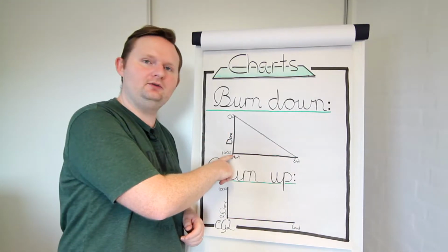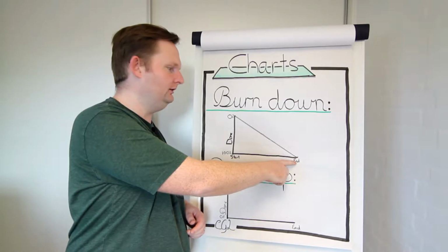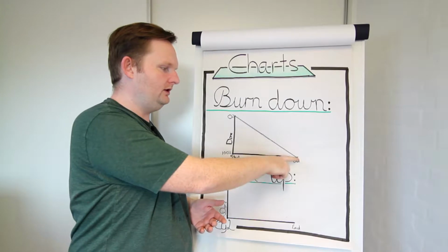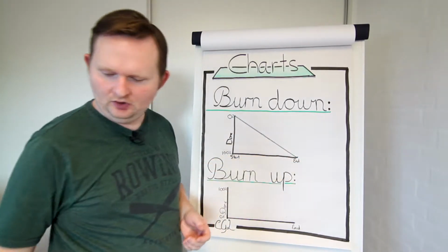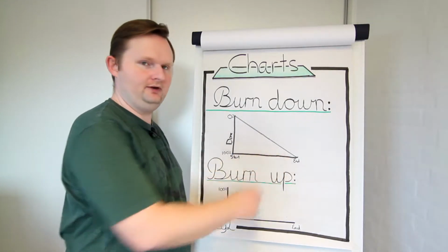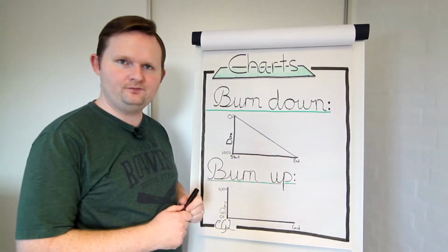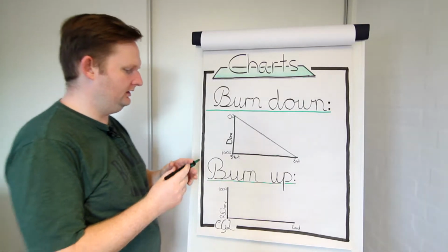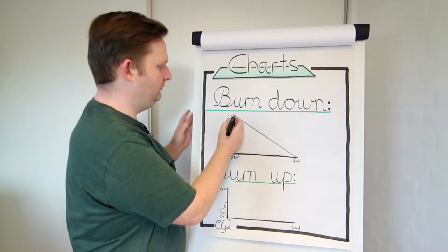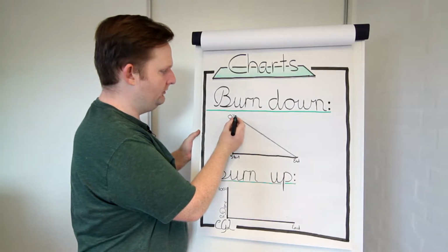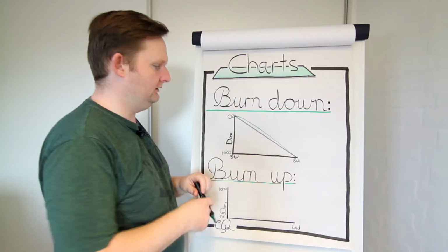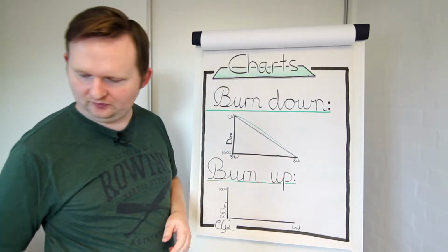Simply put, we have the start of our iteration here and the end of our iteration here. Then we have 0% done or 100% remaining, and then everything is done down here. We would expect it to follow this trend line, right? But in practice, since there is some overhead in starting a new sprint, we probably won't finish something on the first day, so it will be more like this. That is at least what the textbooks say.